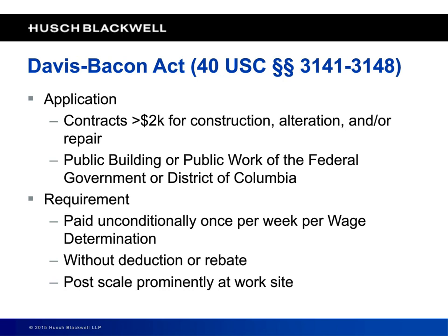Secondly, they said, look, the DC City Center project is not a public work or public building of the DC government because the DC government isn't going to own or operate those buildings. It didn't pay for those buildings. And the argument that they're inuring to the public benefit because there's tax revenue and maybe jobs associated with the construction was not sufficient to convert what otherwise looks like a private development into a covered Davis-Bacon Act job. But I bring that case to light just to demonstrate how aggressive the Department of Labor can be.